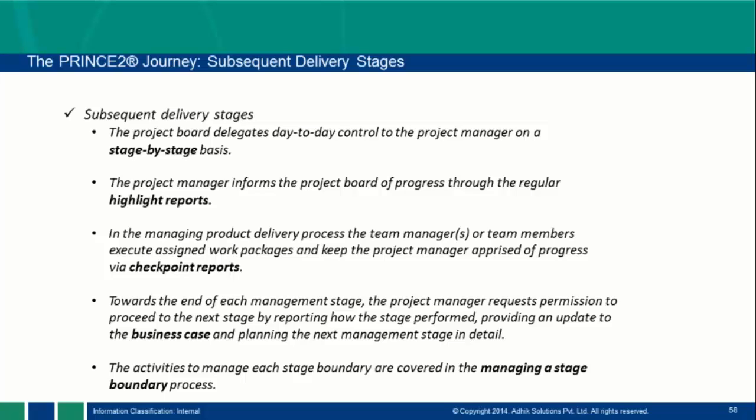In PMP, there is one tool that is called WBS, the work breakdown structure. Using this work breakdown structure, we are creating the work packages. Just assume that you need to build a house. So you need to break down the work, and that is what you are doing with WBS.